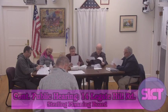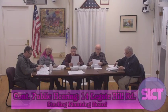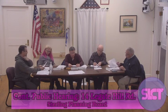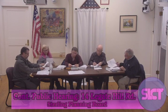So the site-specific conditions will be the applicant shall abandon the existing water service to 14 Leggett Hill Road, turn the connection off at the water main, and service the existing building off the new water main coming into the site. And then number 7 would be the applicant shall submit an as-built plan at the completion of the project to the planning board.